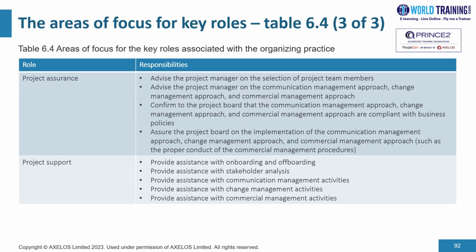commercial management procedures, etc. And finally, the role of project support would include providing assistance with onboarding and offboarding, providing assistance with stakeholder analysis, and providing assistance with comms management, change management, and commercial management activities.